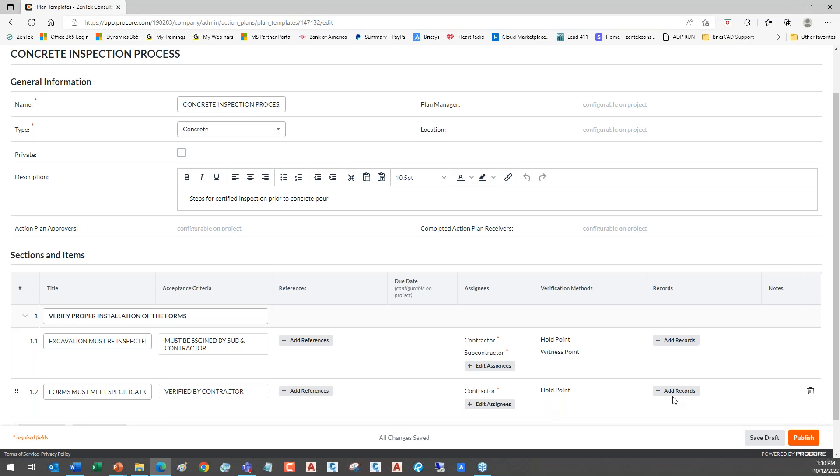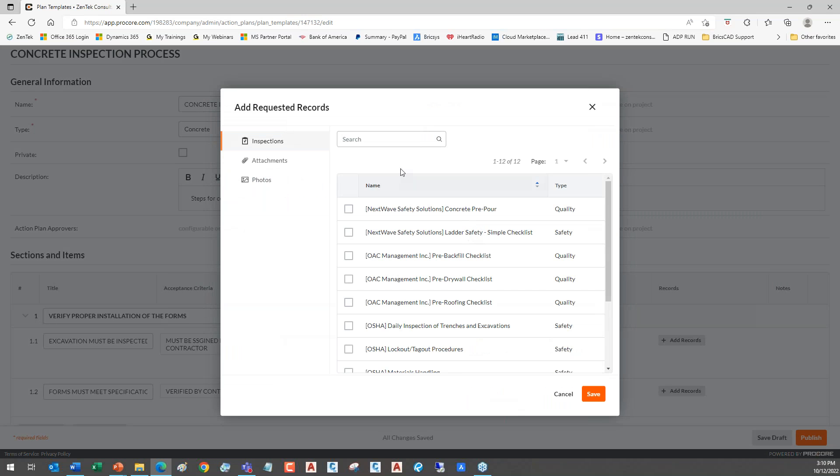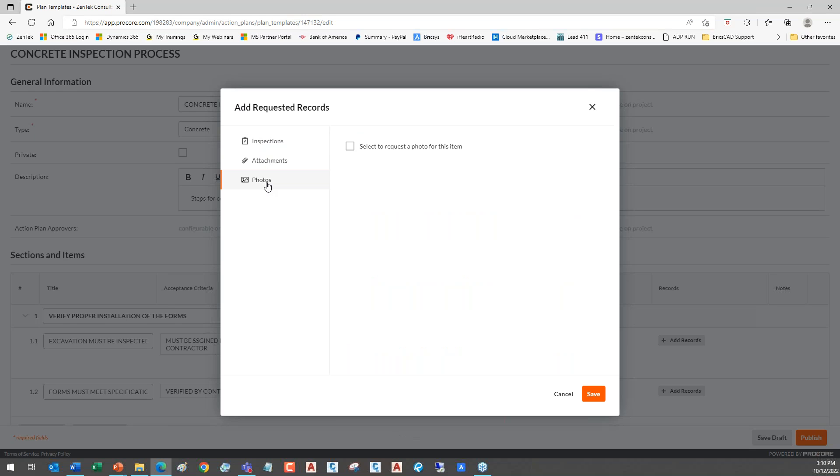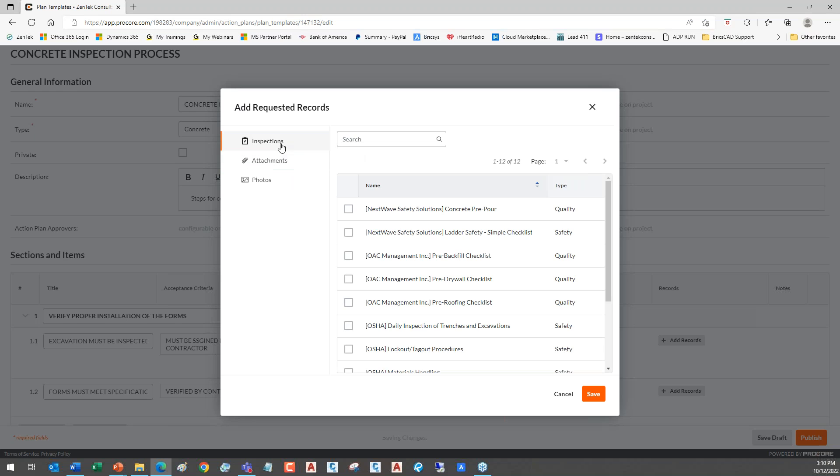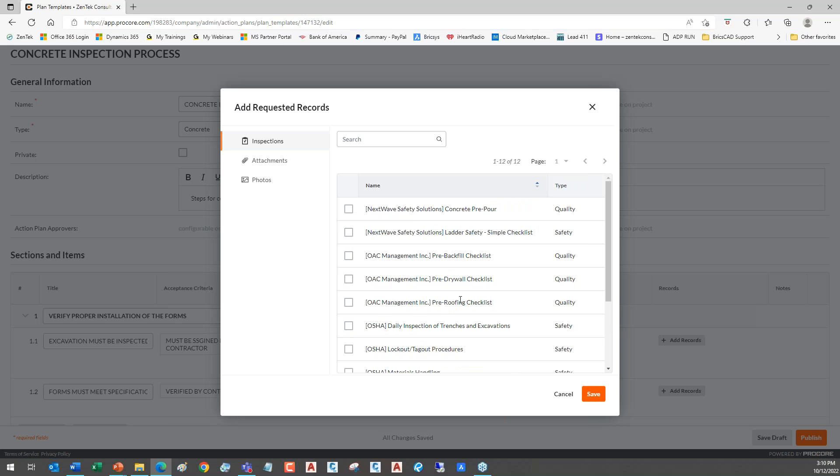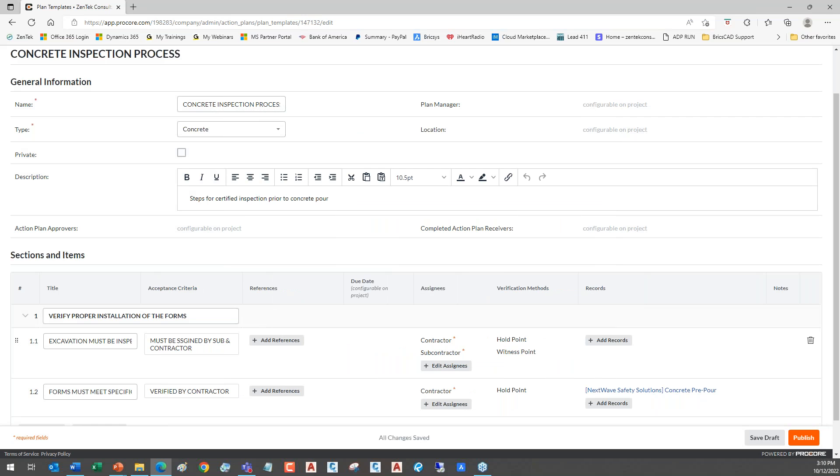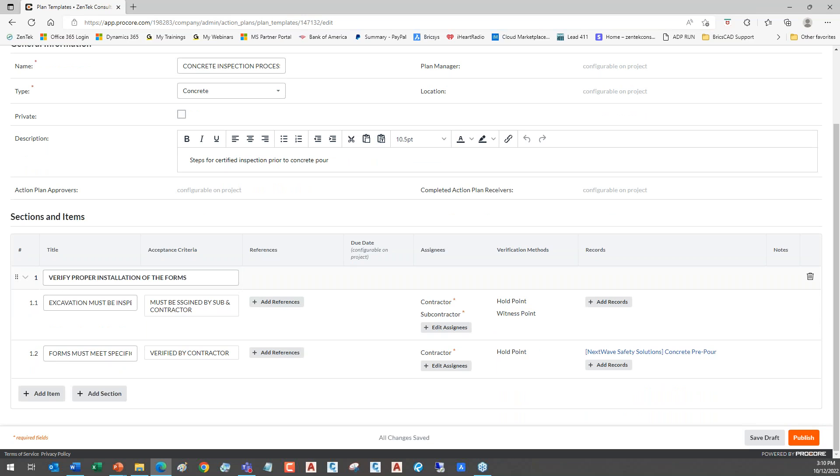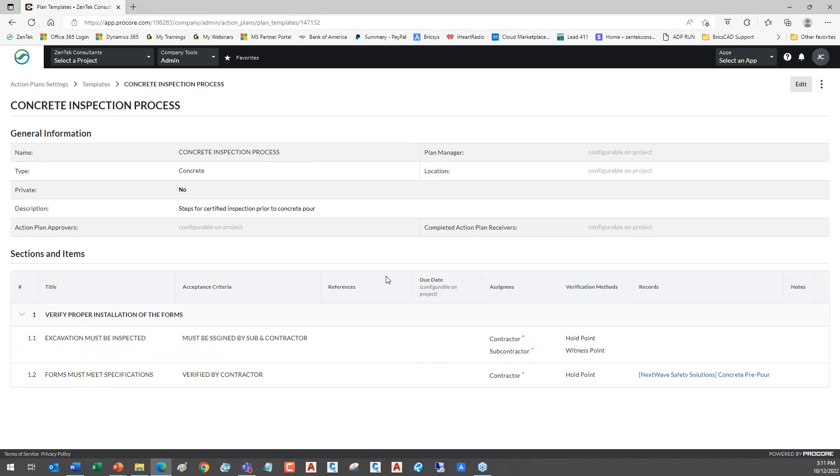I'm going to say all we need is that he has to witness this and look at it and say yep, it's all good. And that's a required step. But then I'm going to add the contractor, the GC. This is a hold point. We can't go on to the next step until the general contractor signs off on this and says it's okay. And I can just continue adding more and more assignees to meet whatever workflow criteria and approval process you have. And I'm just going to go ahead and hit save. You see I've got my first step in there and I'll just show you, you can just go in now and I can add entirely new sections if I need to. I'll just add one more item just to show you it's a pretty straightforward process.